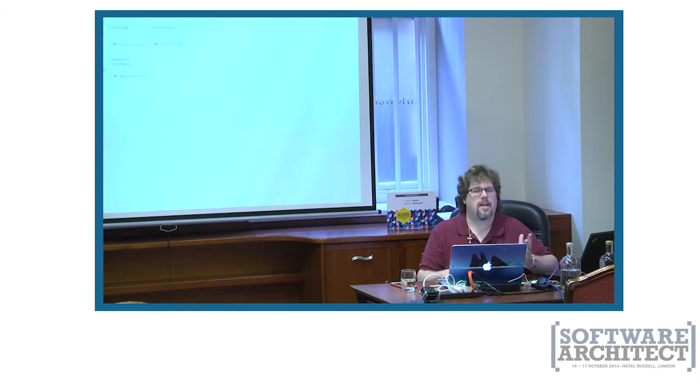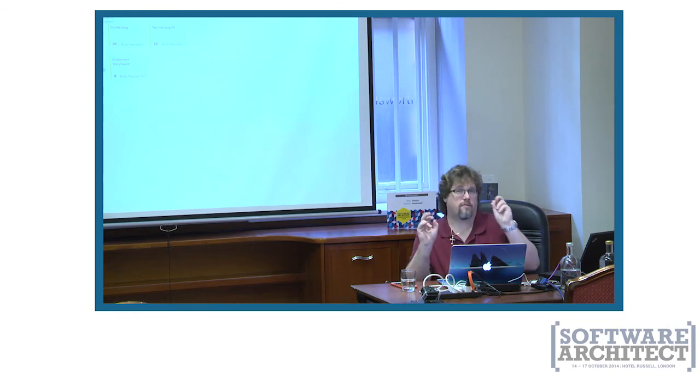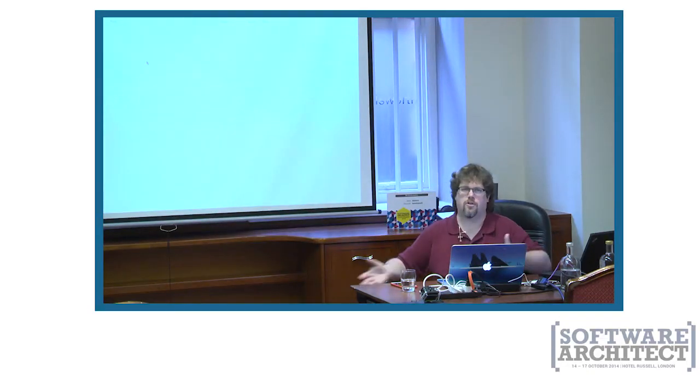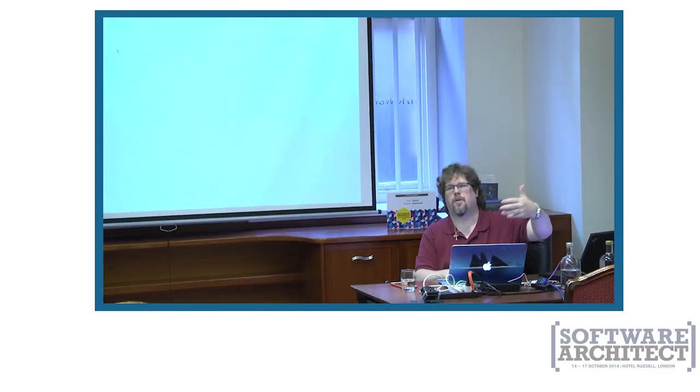All right? Now, everything I just showed you is available at the free level. On the other hand, if you do have one of the paid SKUs, you can actually create higher level items like features. And features are things that go beyond a single sprint and are used to do enterprise or larger planning. You can also create items above that, things like epics, etc.